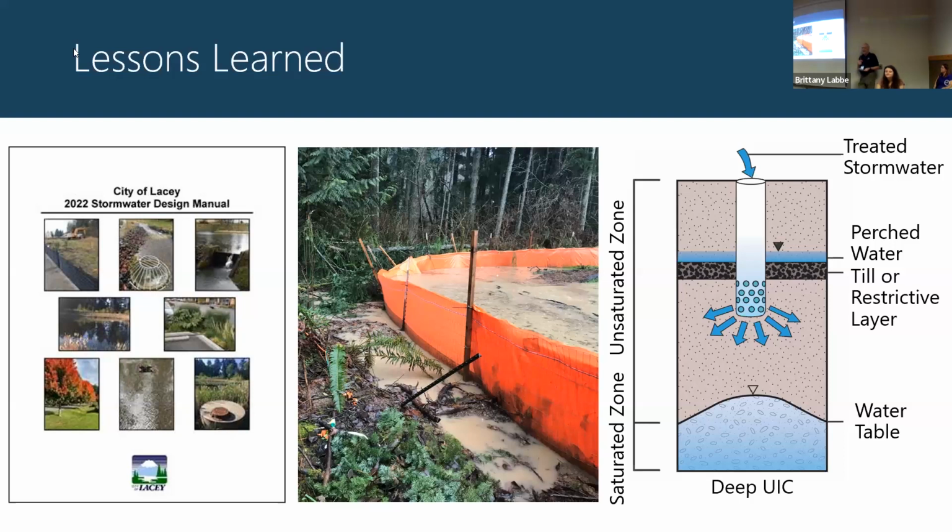And we were having issues, especially with sites that don't infiltrate well. They have nowhere to go with their water. And any site can make a mess, but our big problems were these sites that have till, they have perched groundwater. Sometimes the site will completely flood. That center picture is a site that was just great all summer long, but when the rains came, they turned it into a big kiddie pool with the silt fencing. So that's not working.